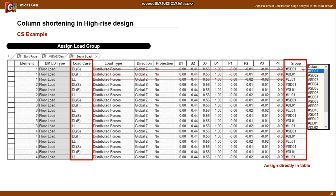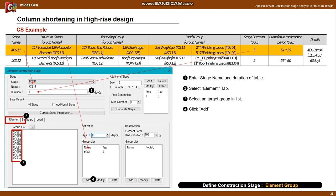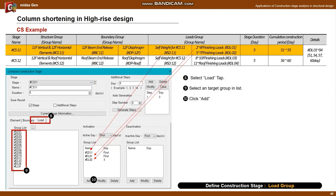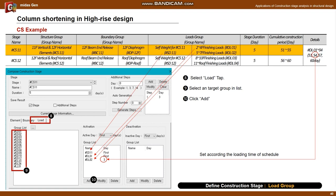Load groups can be assigned by selecting the corresponding group name from the group column in the load table. Now I will create the construction stage information in General - this page is an example of the settings for stage 11. First, enter the name and duration of the process by referring to the schedule table. Then click the element group tab, select the group corresponding to stage 11, and click the add button. Next, click the boundary tab and select the target group names and click add. Finally, set the load in the same way. In the case of DL2, the load is applied after 3 days from the start day of CS11, so the day is set to 3.